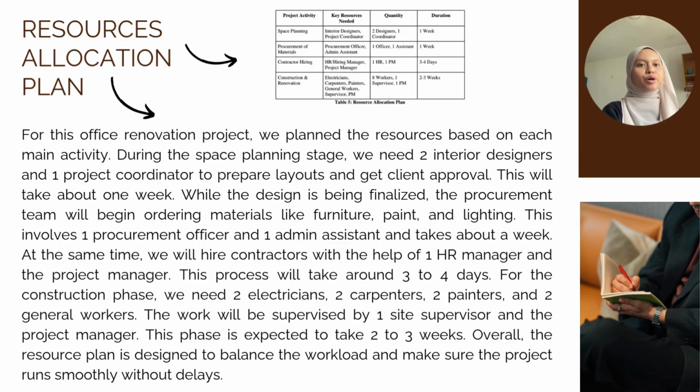I will explain about project resource management. For this office renovation project, we plan the resource based on each main activity. During the space planning stage, we need two interior designers and one project coordinator to prepare layouts and get client approval. This will take about 1 week.